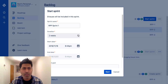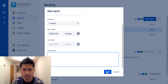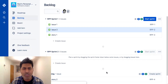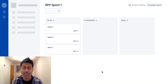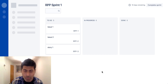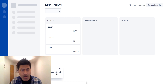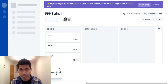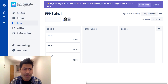I need to first add issues to the sprint that was already there by default. If I click on Start Sprint, I have to select my duration, start date, and sprint goal. Pretty much standard feature if we do a comparison of this Next Gen project with a normal Scrum-based project in Jira Software. It looks good.